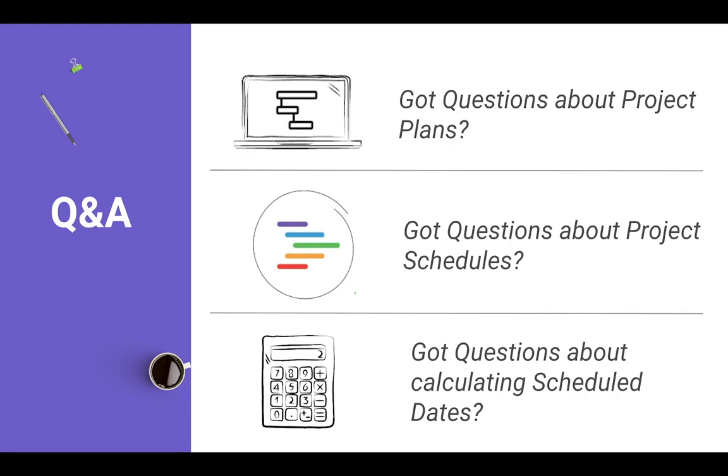Another question that was posed: what happens if I have a fixed schedule and I don't start or finish my task on time? Well, actually, that doesn't apply to fixed schedules. When you have a fixed schedule, your tasks' planned starts are always fixed. They're locked in place, and they'll always auto start on time. And what we mean by on time here is they will always auto start on their planned dates, because those planned dates are fixed.